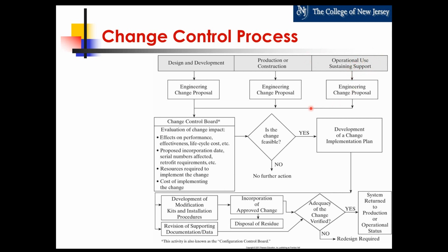But the best case is to find it out here. It's all in the design stage, so you have time to react, and so you can see the value. You can see why when I say that it costs a normalized value of $1, for each dollar that a change here costs, it is going to cost 10 here and 100 here. So hopefully you can see that impact as we talk through this.